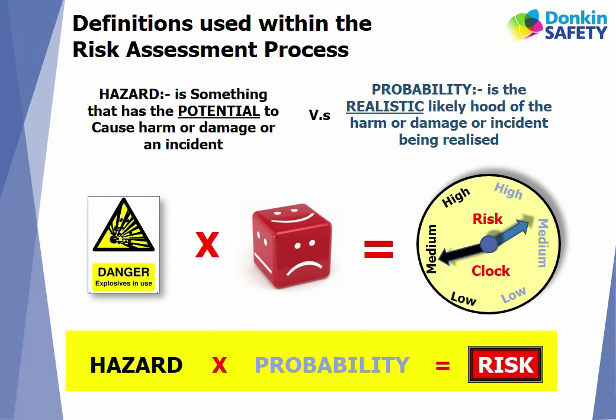The assessment of risk is an educated and realistic calculation between two things: the hazard, that is the potential to cause harm, and the probability, that is the realistic likelihood of that harm occurring.